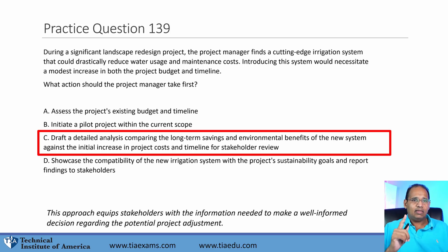Now, notice, what should you do? Basically, what should you do first? I like this one. There's two good answers, either A or C. You just don't want to showcase it. You have to assess its impact on the project. You shouldn't push it out either unless you know how it's going to impact the project. Assess the project's existing budget and timeline.